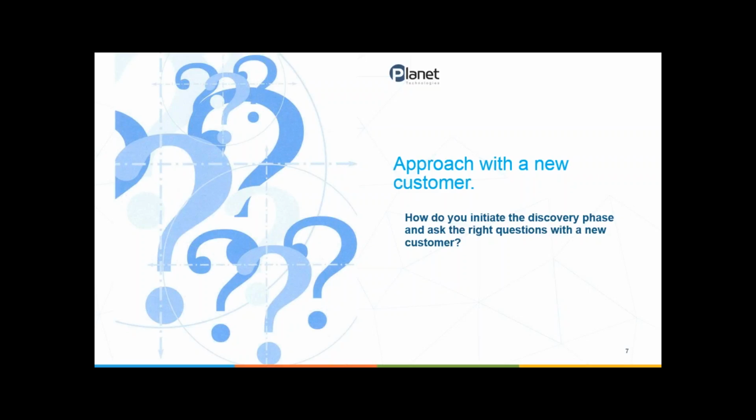The actual technical deployment team will go in and we'll start with performing due diligence, discovery in their environment, determining exactly what they have in their environment, based off of hardware, existing platforms, processes, applications that are installed on the existing operating system, if they have any legacy environments. And we work a lot with state and local governments.